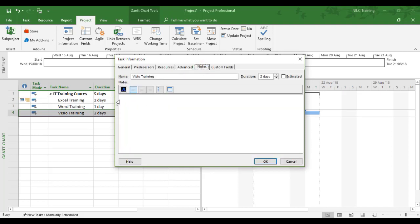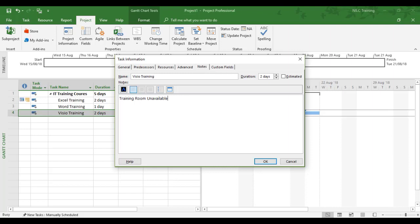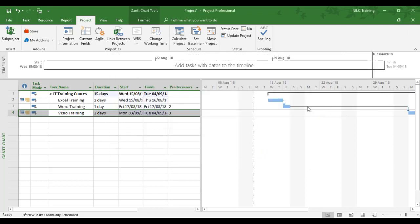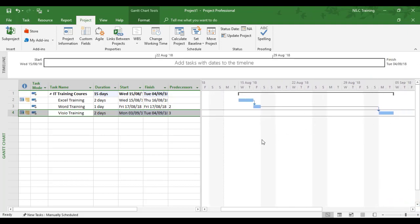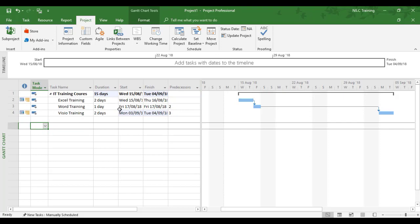We'll put a note in and say 'training room unavailable,' click OK. Now you can see the link between the Word training and Visio training has really extended because the Visio training has been severely pushed out. The duration of the three together is now increasing. The summary of all three is increasing by the effect of the constraints. If you see any blue behind any dates, that means the effect of what you've just done. The last constraint knocked the last two dates out and affected the duration.